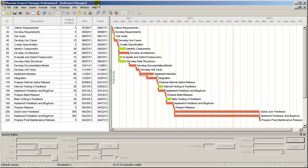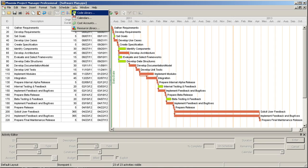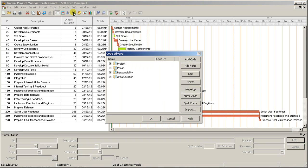To get started, go to Info, then Code Library in the toolbar. The Activity Code Library is where you can manage your activity codes and the values that can be assigned for each code.